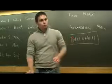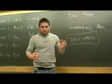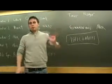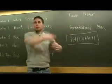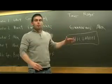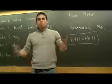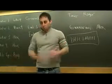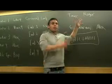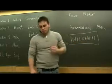So the monitoring and controlling, there are 3 basic parts of the monitoring and controlling cycle. It's really a continuous cycle. You don't just do it once, you don't just do it twice, you keep on going until the project comes to a close. And there are 3 parts. The first is measurement. Where in the whole process are we? How close are we to achieving our goals?